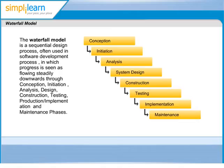The purpose of the initiation phase is to conduct an initial high-level investigation of the business need and come up with a recommendation for the solution. In this phase, the sponsorship commitments are secured, budgets, timelines are finalized and objectives for each phase developed and signed off. The core team for the project, including the project manager, is also identified here.